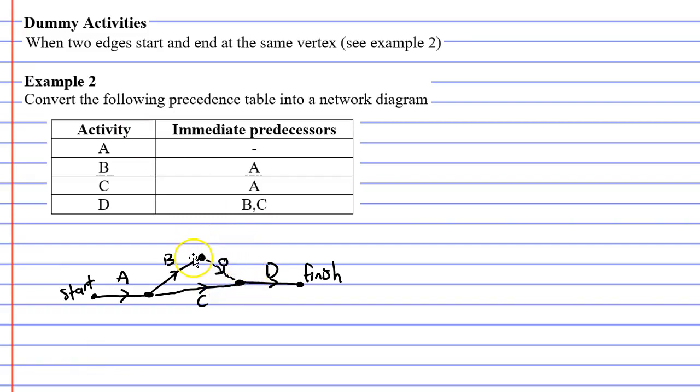Since the weight of the dummy activity is zero, having these two edges here is equivalent to having just a single edge. Now activities B and C are the immediate predecessors of activity D without either of them being a curved edge.